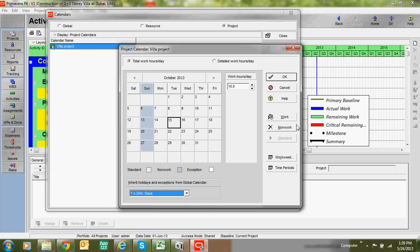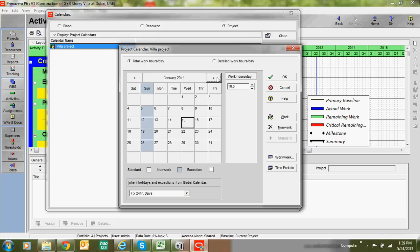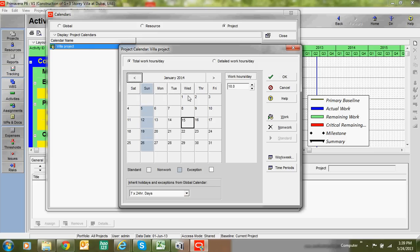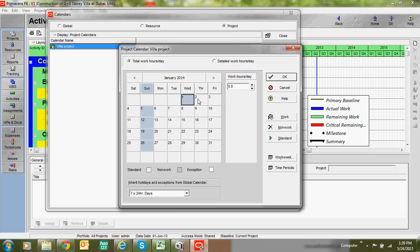One more thing: if you have public holidays — for example, January 1st, 2014 is New Year — you can add those as non-work days. You can add holidays as non-work days this way.